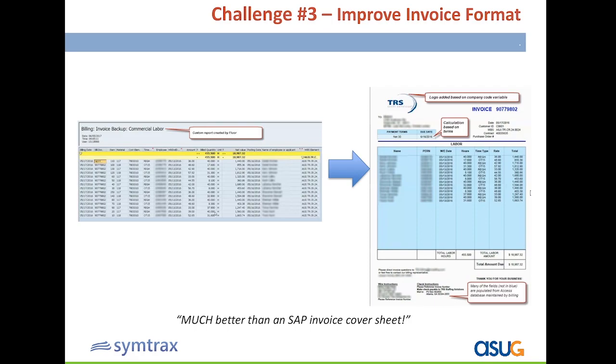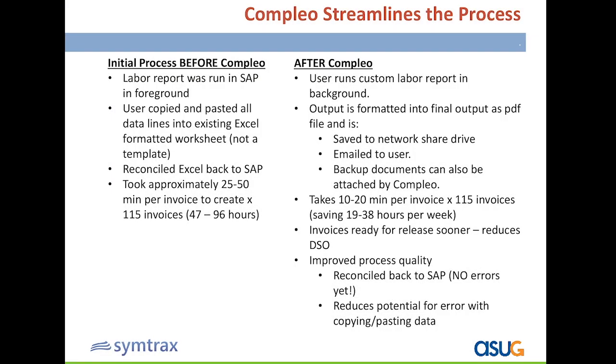And a lot of this data has been added by query variables based on an Access database that sits off to the side that says, okay, if this is WBS, it's all driven on WBS, which is our work breakdown structure. If this is WBSX, then the contact information, like deliver this check here or pay here, all that information is driven onto the invoice from the WBS. The purchase order can go there as well.